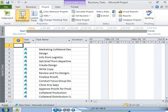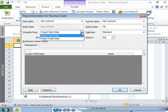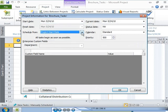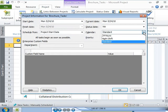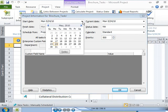In the project information dialog box, you can specify the start date and finish date. You can also specify whether you want the project to be scheduled from the start date or the finish date. In addition, you can specify the base calendar to use as the project calendar. By default, the standard calendar is used and project 2010 sets the project start date to the current date. You can change the project start date.